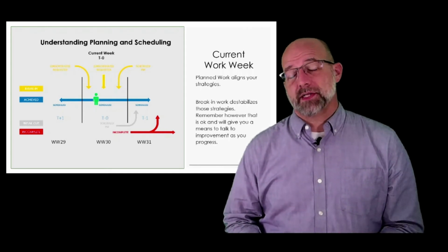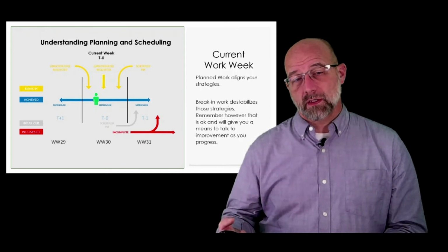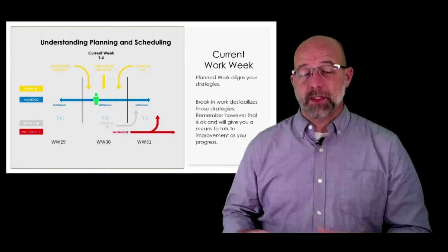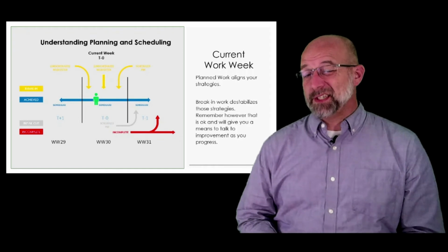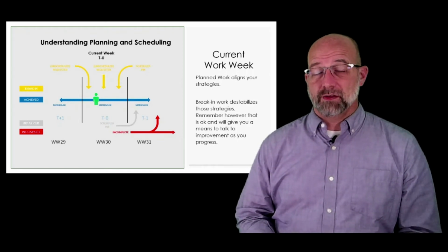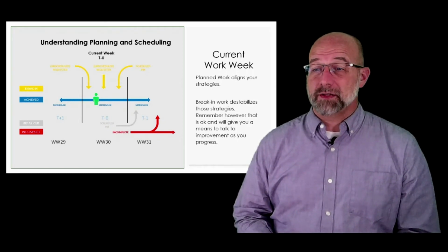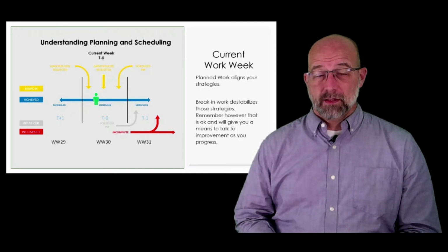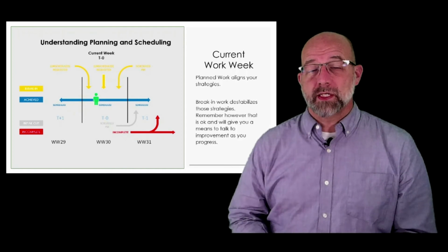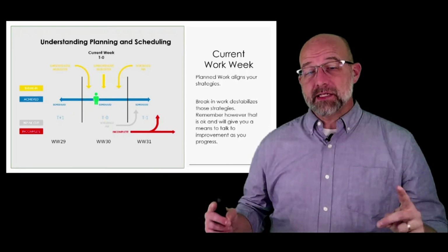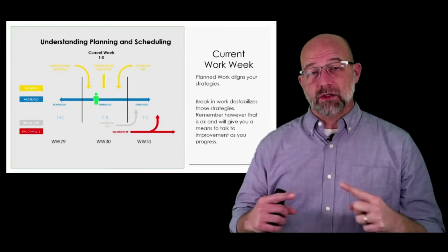On the opposite side of that, if you have a lot of incomplete work and not a lot of break-in work, that means that we're going to probably have a very different conversation with, say, the technicians, making sure that they are completing their work. Because you had it scheduled and you should have gotten it done, why didn't we complete it? So again, these two ratios need to be very close together.